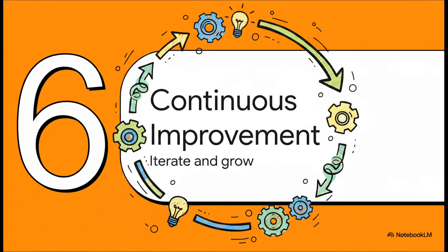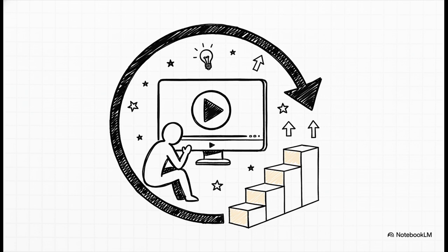And finally, Section 6, the cycle of continuous improvement. Iterate and grow. Because you know what happens the very next day? The cycle immediately repeats itself. The team takes all that valuable stakeholder feedback plus their own retrospective learnings, and they feed it right back into planning the very next sprint. They establish a brand new sprint goal like enable students to enroll in a course and start watching learning content. Now they're tackling video playback. They are building incrementally and adapting constantly.